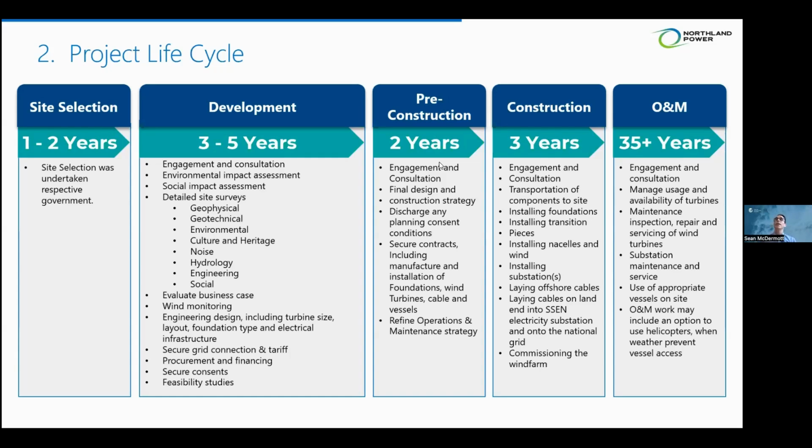than offshore. This is sort of a sample development cycle or project life cycle that shows that from when you start investigating your site to when you finish operations and commission, it can take 8 to 12 years.